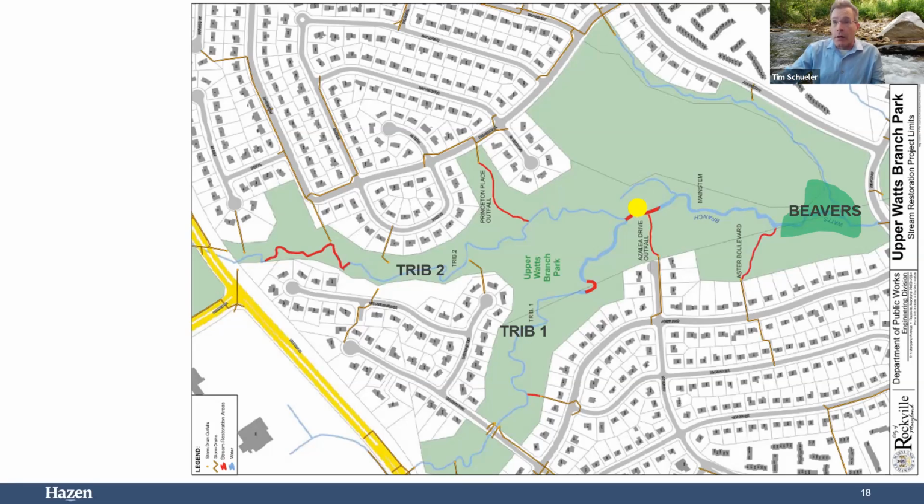That archaeology study is pretty involved. It took a long time and it was kind of tough. We just finished that up before construction. It was one of the most time-intensive elements. We also said that tributary 2, which had less stormwater management and therefore more erosion, had a pretty long stretch that needed some work. It's about 700 feet. So all in total, we recommended about 2,000 feet of work out of a total of 10,000. But of that 2,000 feet, 1,000 of it was those ephemeral drainage ditches. So we were only impacting about 1,000 feet of actual perennial stream.